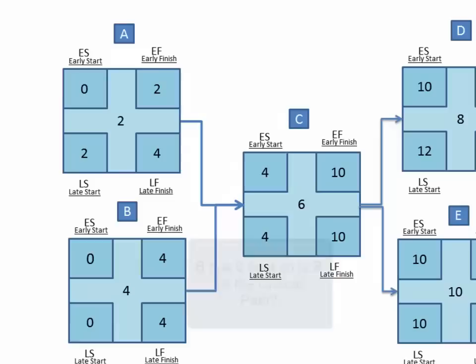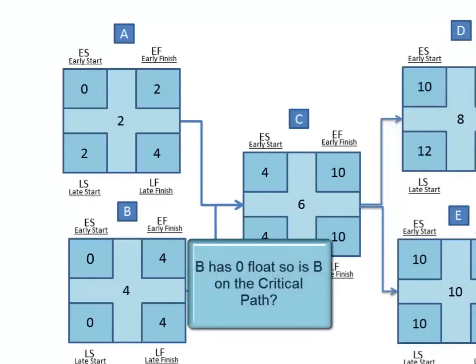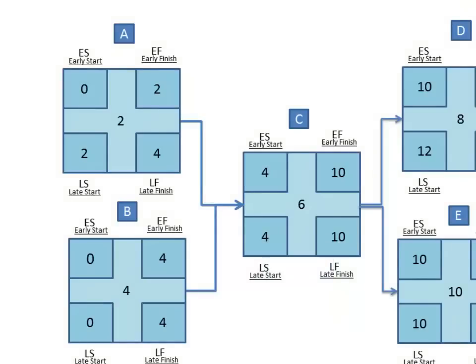Alright, I'm certain you know this one. Is B on the critical path? You're right it is. Any task with zero float is on the critical path.